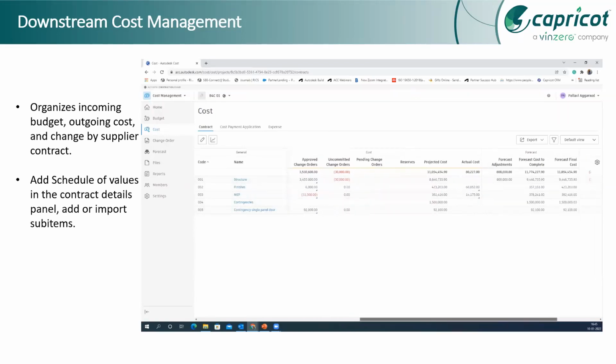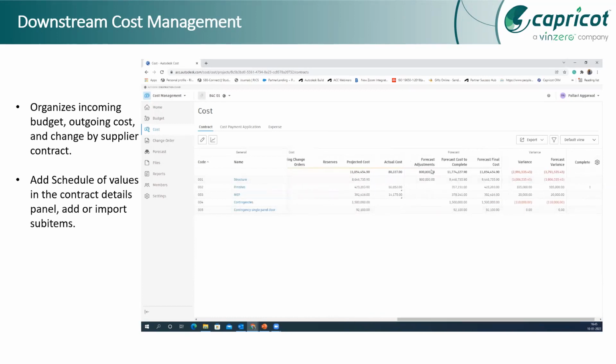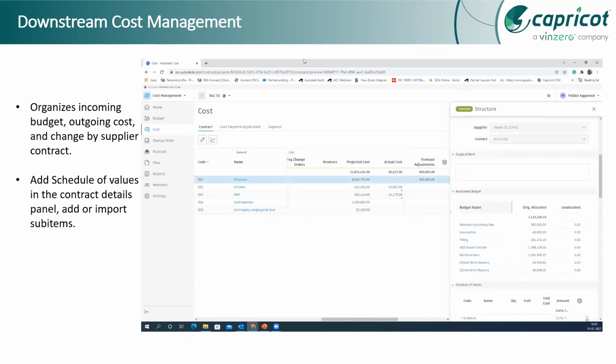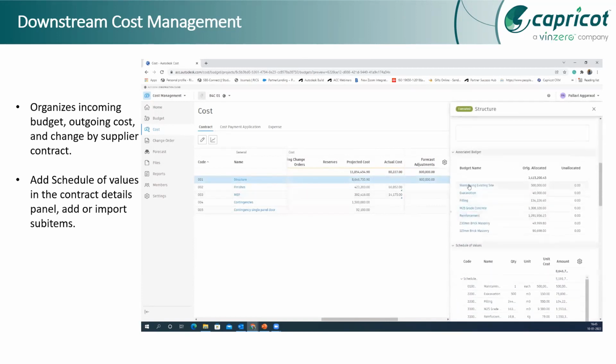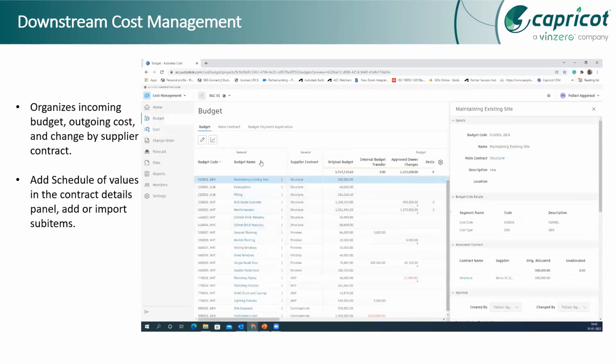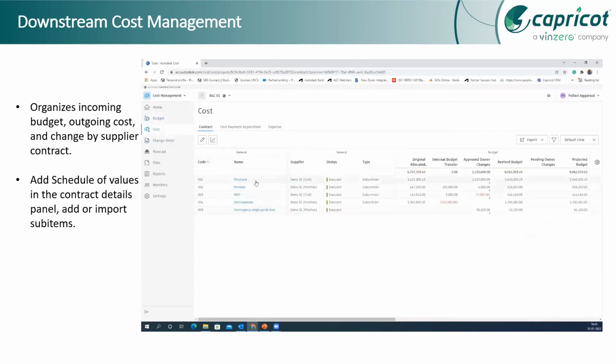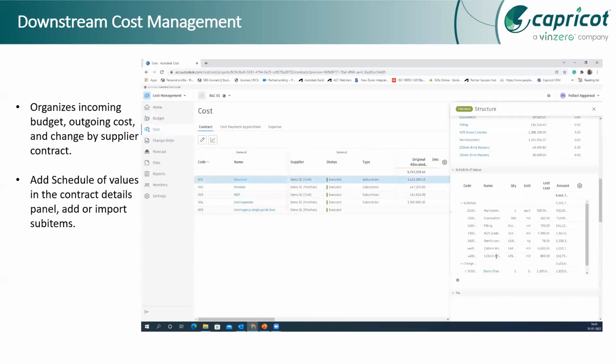And after that, again, the internal communication, let's say the bill transfer or the payments that are made, and the change orders which are there will lead to a lot of changes in the cost, which will lead to some sort of projected budgets. And then we have to track how many payments have been made or what other dues are there. Once that is done, there is a comparison between the two, and we get a forecast from both tabs. And these forecasts can be visible again on this extensive list of columns that we have in the platform.